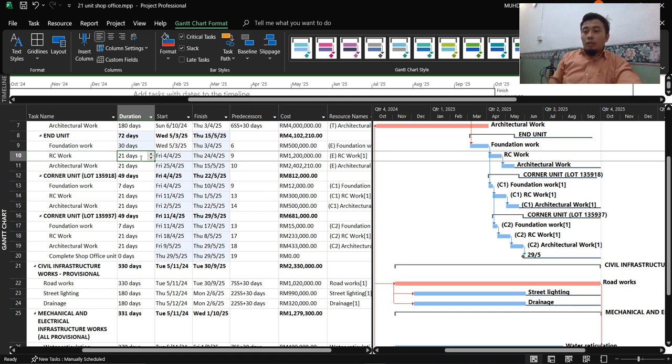That's number one, a good thing about this. And number two is we are distributing the work. So you won't need a lot of workers at one critical time, because you are distributing the period of work. You will need less manpower for each task, because you are increasing the duration, so you are reducing the productivity demanded of the worker. So basically you are reducing the cost.